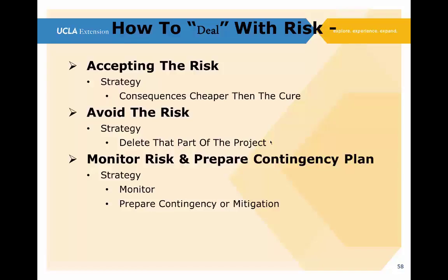And should implementing any mitigation or contingency have a cost, in other words, if we were adding personnel, adding staff, then that cost does not go into the risk pool. That cost has to go into our budget right now because we will be spending that money. If our mitigation is costly or requires funding, then we have to do it.